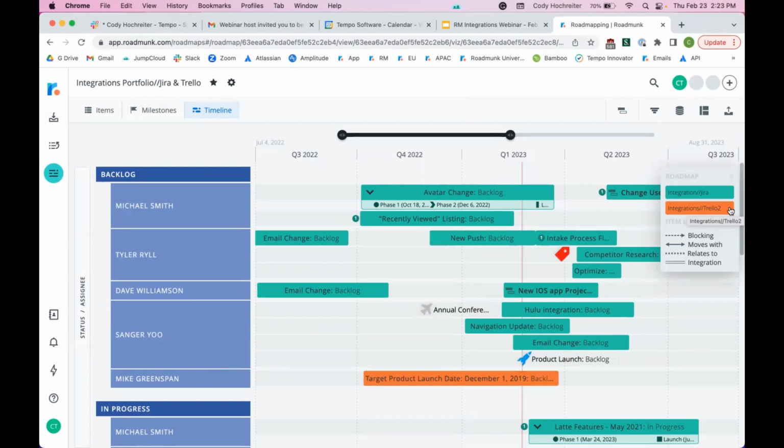That really depends on how your Jira is set up. For us, we set it up as different projects. Every team has one or several projects that they work on. Within those projects, we set up different teams and we bring in the epics and issues that have to do with those projects. And that's what you're seeing on the roadmap.